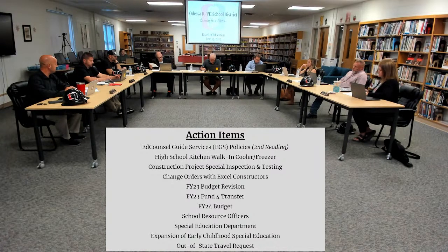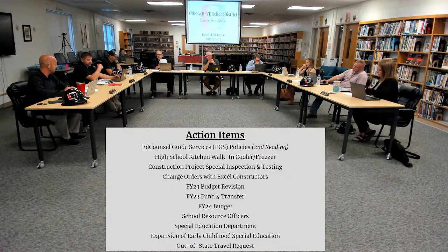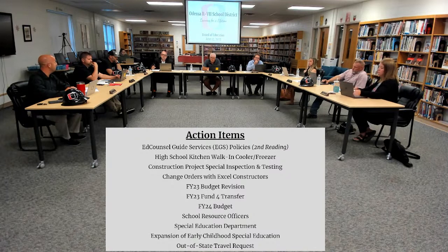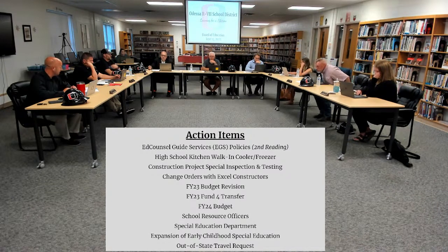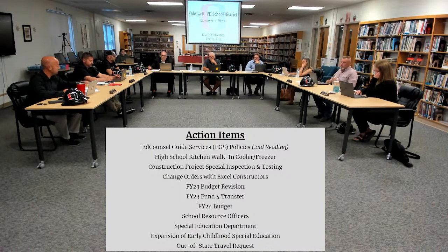So in your packet was information. We solicited bids for a new walk-in cooler freezer combination here at the high school for aging and failing equipment. We received 3 bids. The recommendation would be to hire Behrman Heating and Cooling to replace that, at a price of $7,320. That's for a new cooler and equipment, and then a new freezer box. We would reuse the existing equipment on that because it was replaced within the last few years, so it's still good to use on a new box.